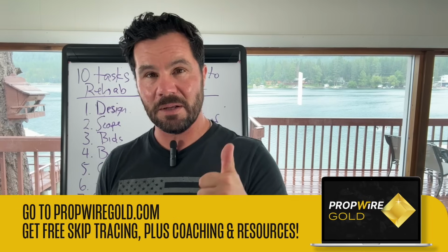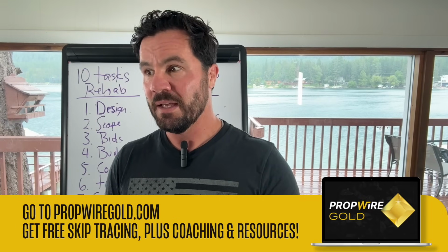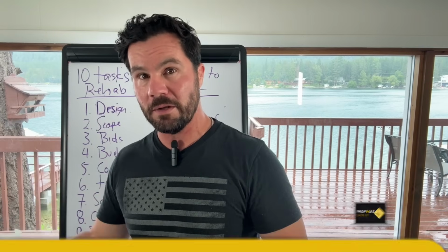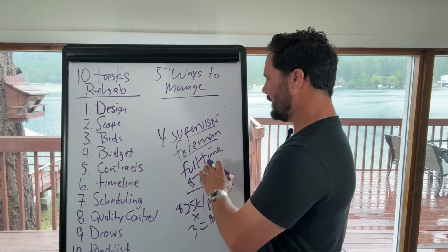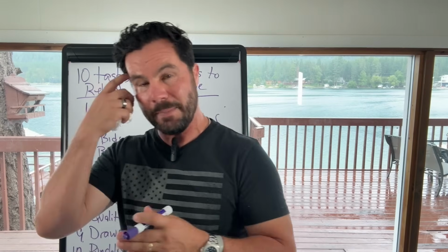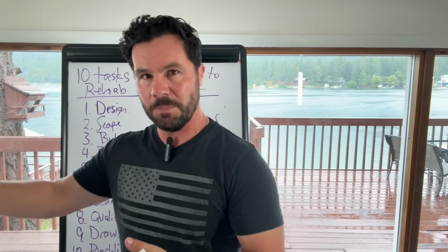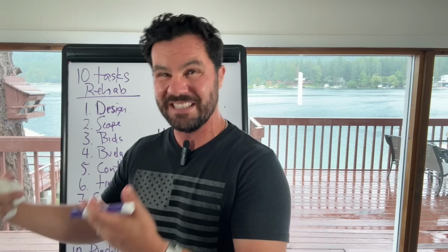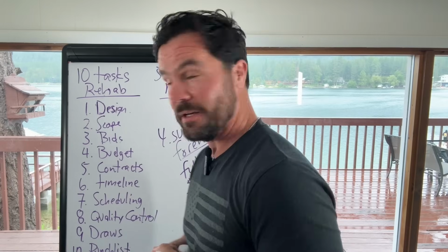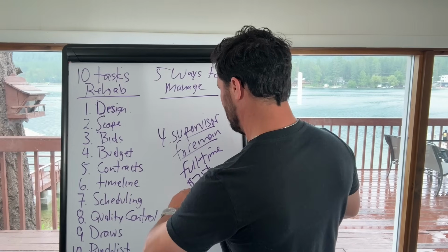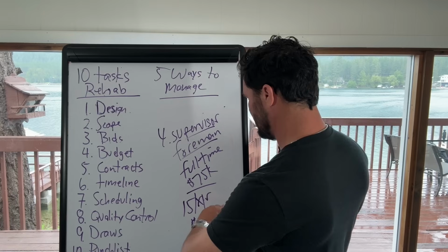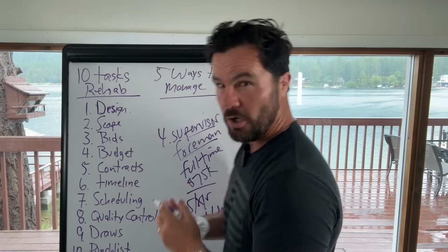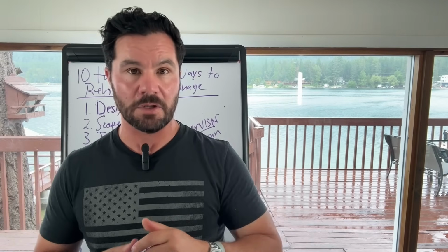Remember, it's not just about saving money or the cost of the rehab. It's about the speed of the rehab and the quality of the rehab. All three of those have to work together successfully. The full-time foreman, there's a tipping point where that makes sense. And until that tipping point in terms of volume of deals, volume of rehabs, it isn't going to make a lot of sense. So for example, let's say that you're doing 15 projects in a year, and at $75,000, that's about $5,000 per rehab as your management cost to have that supervisor on payroll.